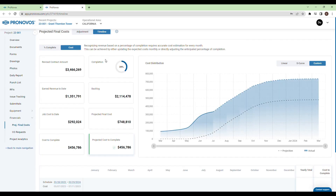Our platform empowers contractors by simplifying the industry standard practice of revenue recognition through the percentage of completion method. It offers a user-friendly solution for accurately forecasting the percentage of work completed or costs incurred each month.